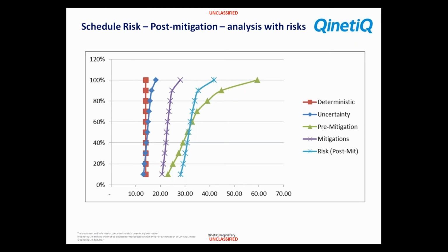Your project manager now has the ability to consider what if. What if I only consider some of these mitigation actions and let the risks mature on the others? No problem, we can model that. And again, quite frequently we see organizations that pitch at the 50th percentile for their schedule risk analysis. They would say that they will deliver somewhere around 31, 32 days, and they'll have a 50-50 chance of actually delivering that, because some of the iterations will be higher and some will be lower.